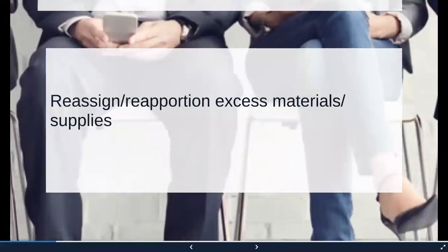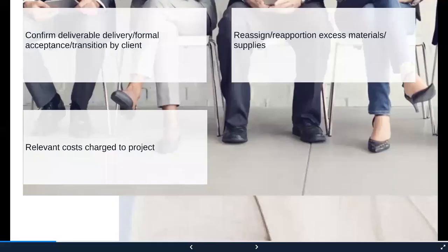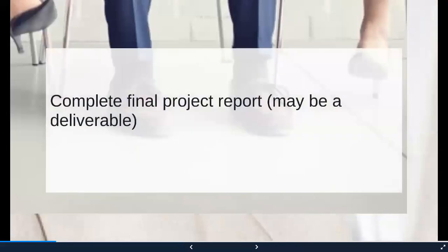Reassign or reapportion excess materials and supplies. Reallocate project facilities or equipment. And ensure that relevant costs are charged to the project. Closing charge accounts, cost accounts, project accounts should be done, and complete the final project report. This could actually be a deliverable.